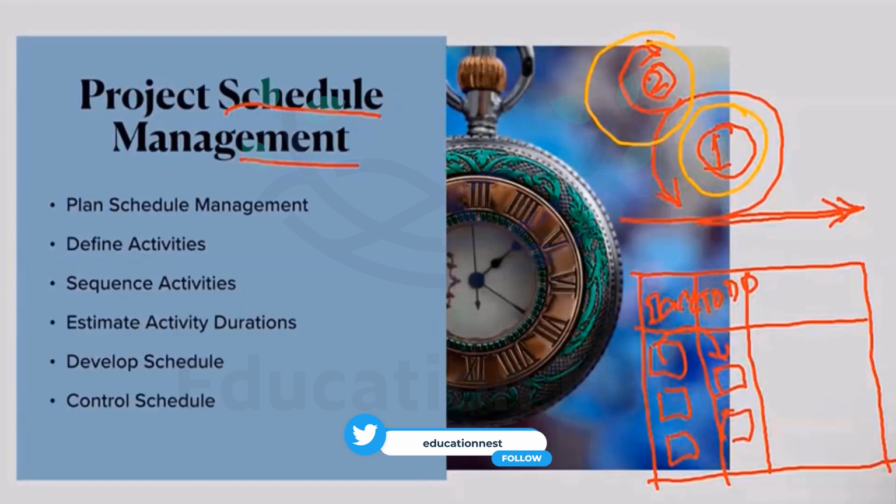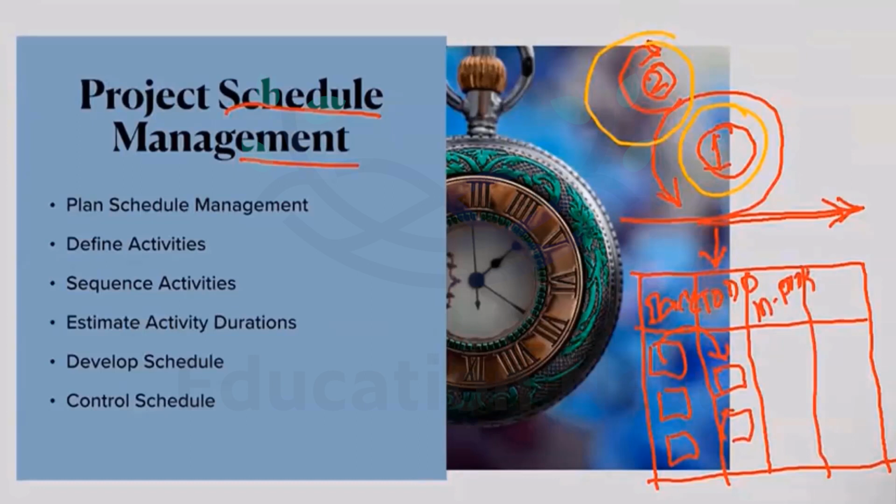So in to do, it is just those decided tasks, but if they are started actually, they will be in progress, right? Out of the list of 10 tasks that we have identified as to do, whatever tasks have been started by the team, they will move to in progress. There could be one more column that is called blocked, or testing, or under progress.